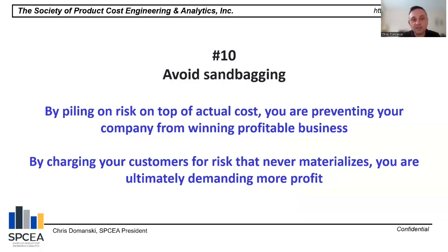The opposite here is sandbagging, and that's something also you should avoid. By piling on risk on top of actual cost, you're probably preventing your company from winning profitable business. And then by charging your customer for risk that never materializes, you're ultimately demanding more profit. This sandbagging really ultimately could be very deadly to the company, because most of the time it leads to you not winning business. And really nobody taking responsibility for it, or nobody even knowing what happened.